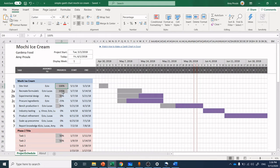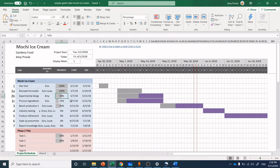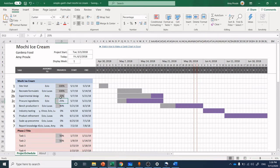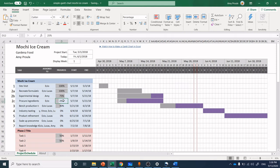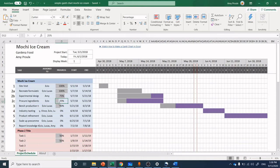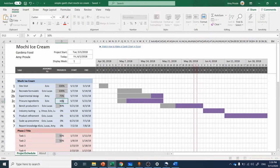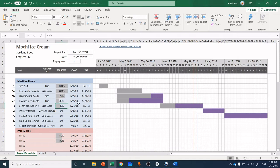And there's also a function where you can track your progress. So maybe on the site visit, we're done. Maybe on the recreation of the formula, we're done. But here on our experimental design, we can adjust the percent of the tasks that's being done. And having this capability of tracking progress and completion of tasks is really nice. When you go into team meetings or scrum sessions, you can open up your Gantt chart, and you can talk to the different team members and say, hey Ezio, where are you at on this task?